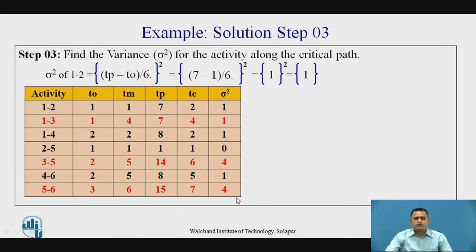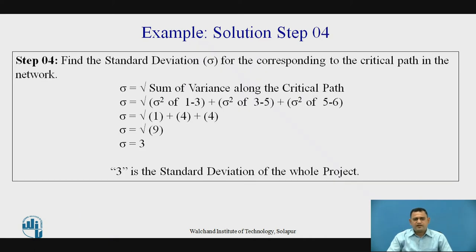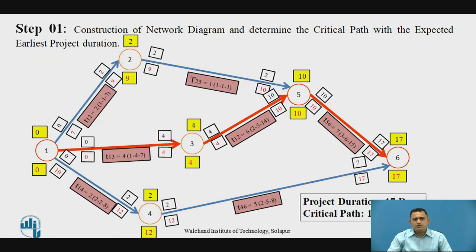Step 4 is to find the standard deviation. Sigma equals the square root of the sum of variances along the critical path. The critical path is 1-3, 3-5, and 5-6, so we take the variance of only these activities. If there are two critical paths, we select the one with the larger number of critical activities.